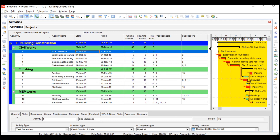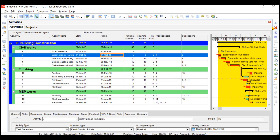If there were a milestone in the project, it would look like a diamond in black color in the Gantt chart. Since our project has no milestones, no diamond is displayed. One more thing I forgot to mention — copying and pasting activities: if you copy and paste activities, the relationships will not get pasted. You need to assign new relationships to any newly copied activities. That's all about assigning relationships. The next video will most probably be about calendars. Thank you and goodbye.